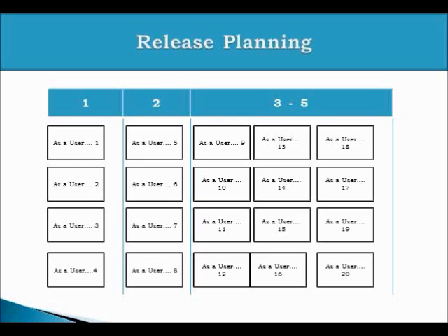They should be INVEST stories, meaning they should be small enough to be developed. They should have a good amount of information attached to them, and once you start developing them, you should also have acceptance criteria attached. But the stories which are getting developed at a later stage may remain at an epic or a higher level.